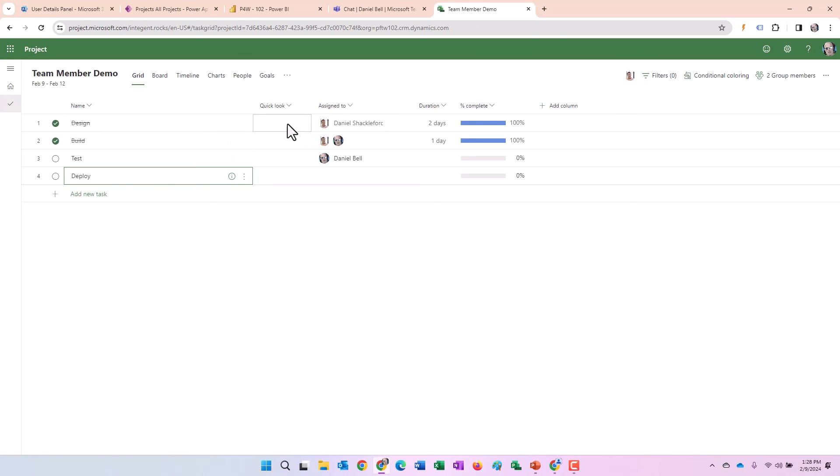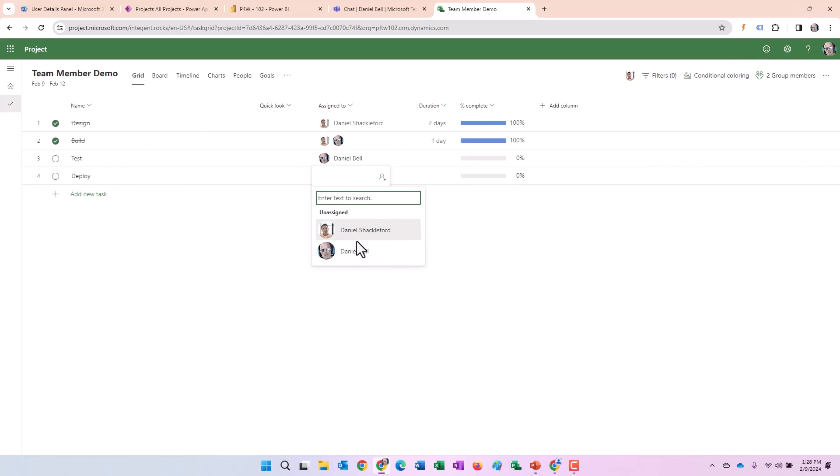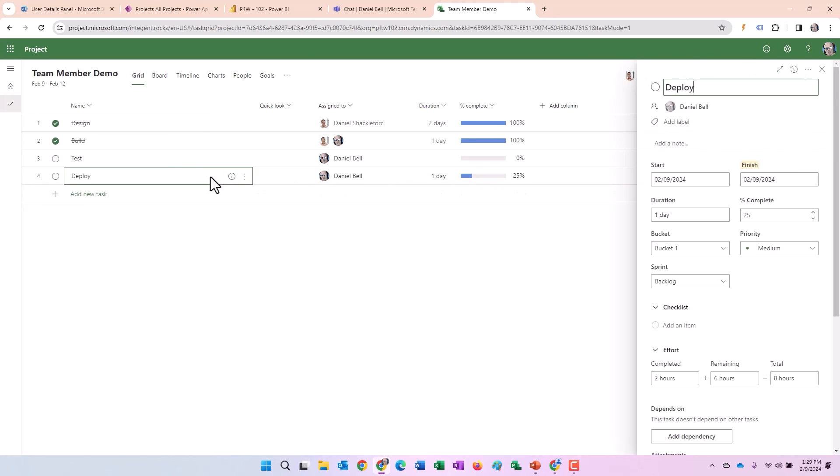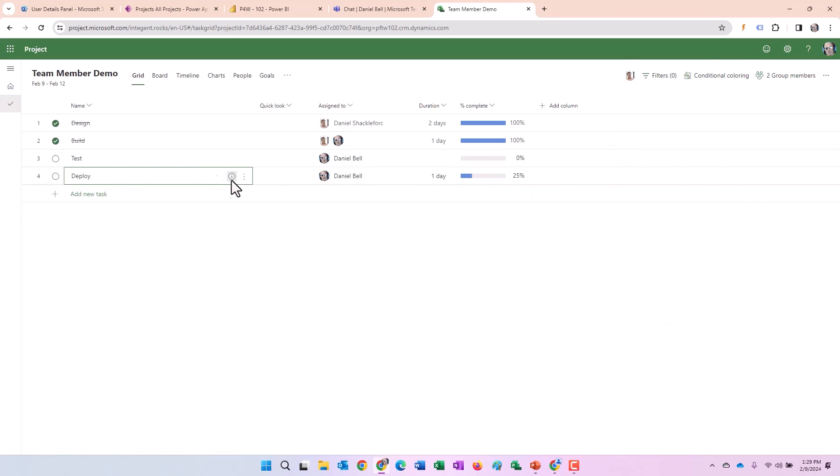Just like I did here. The progress on this one task was only Dan Shackelford's work, whereas if I had me assigned here like so and I specified whatever it is, 25% complete, that 25% complete is just for me on my task. So there you go, folks.